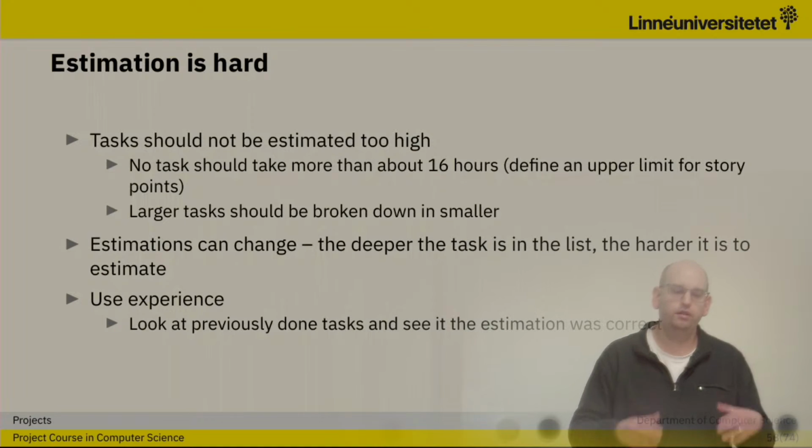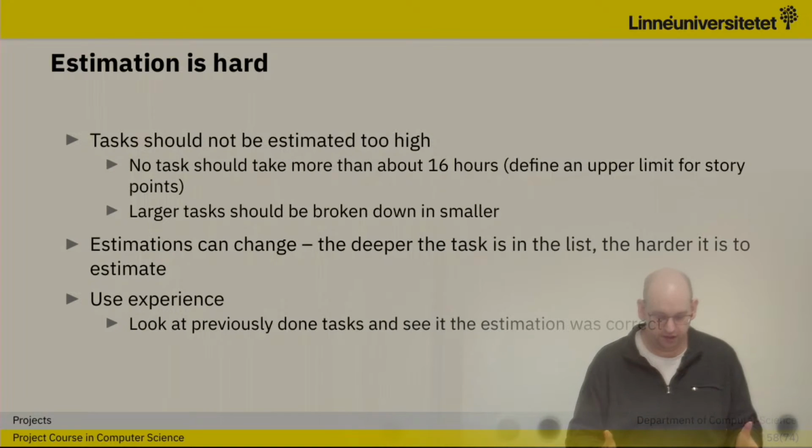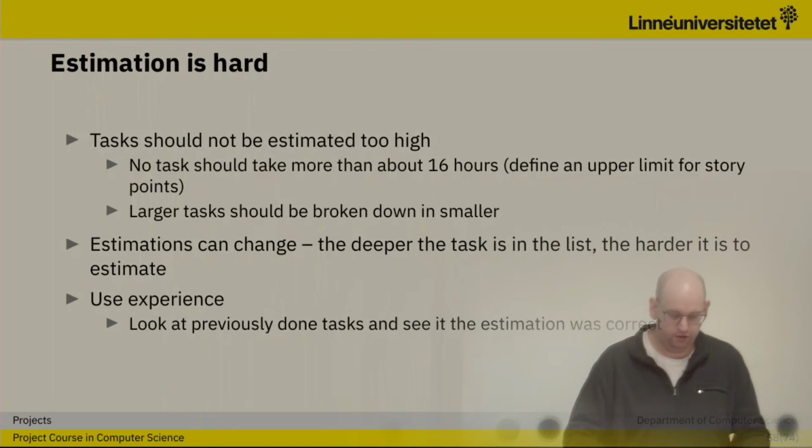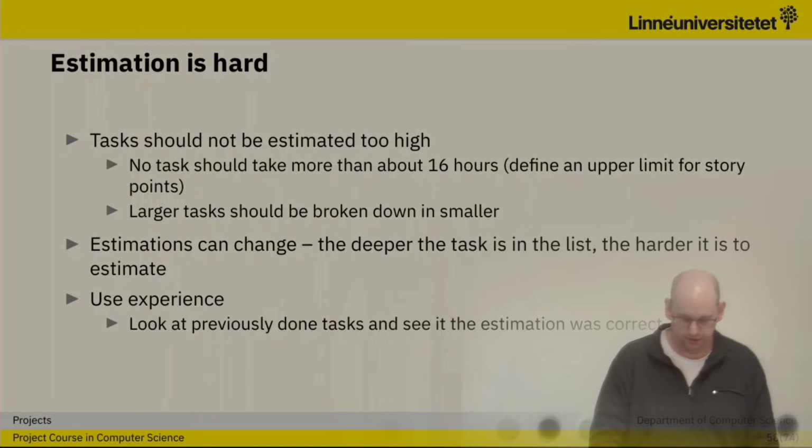Try to see user stories as a maximum of 16 hours or 16 story points, or rather the story points could be higher, but things shouldn't take more than 16 hours to do.